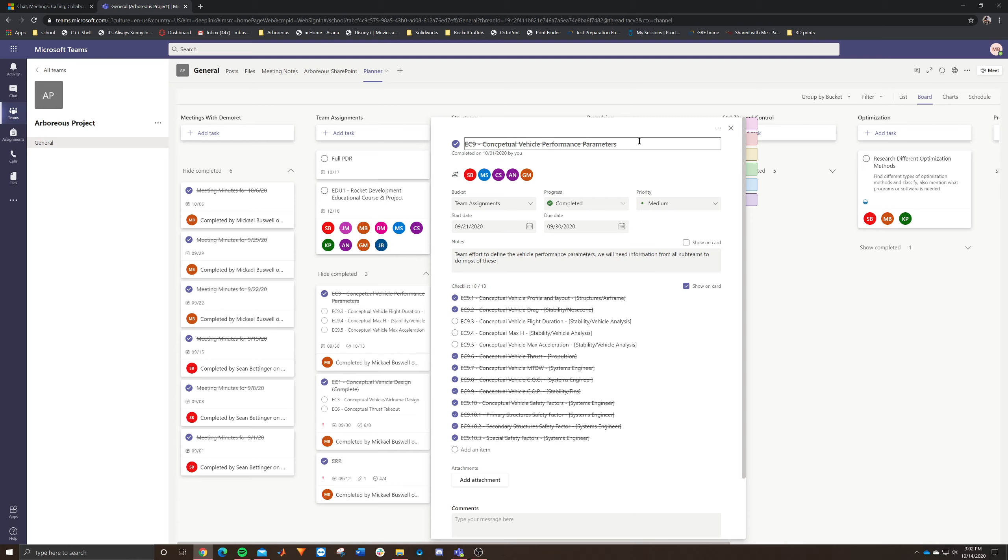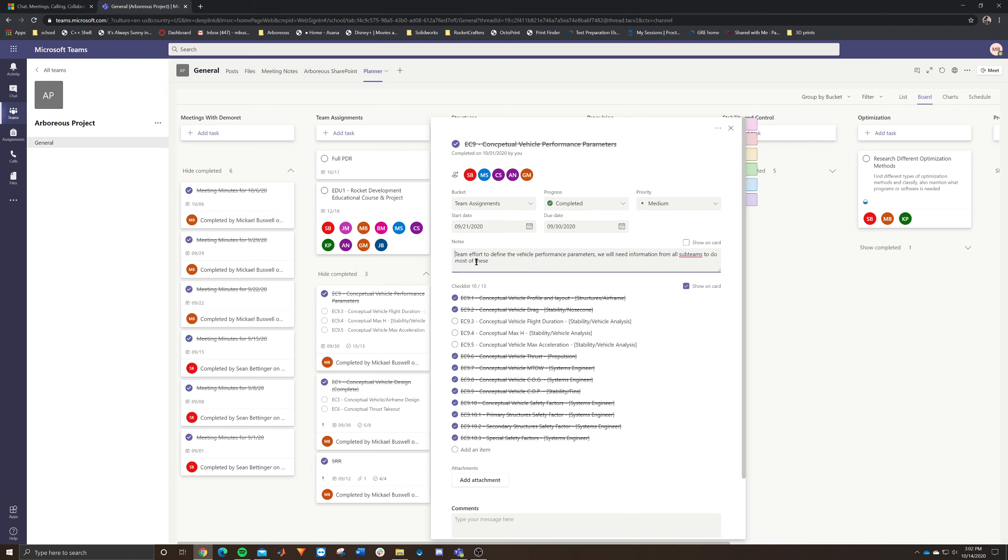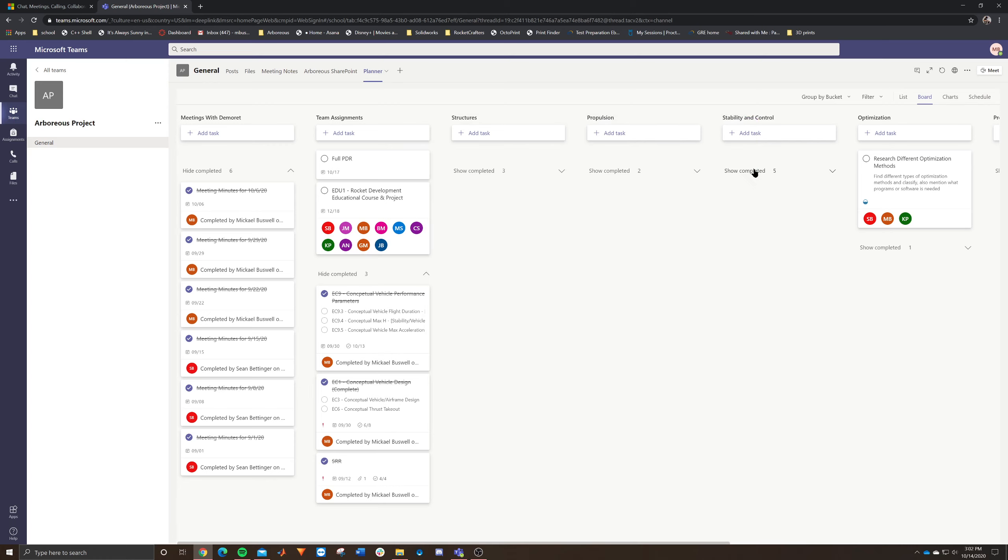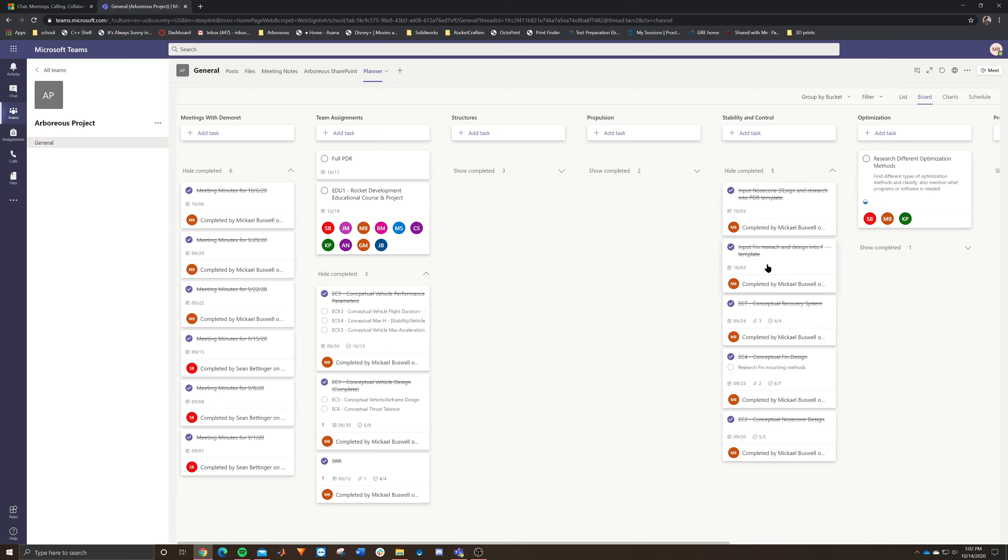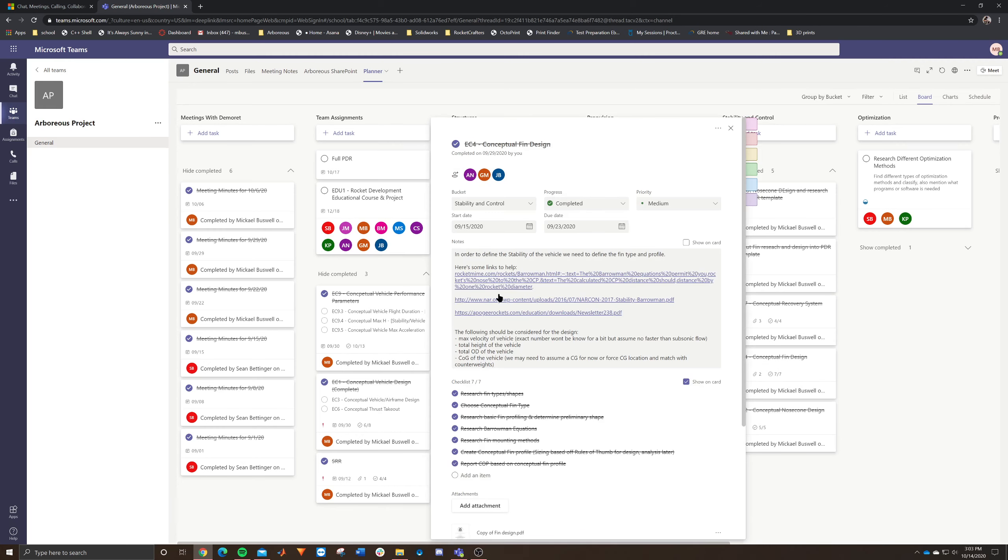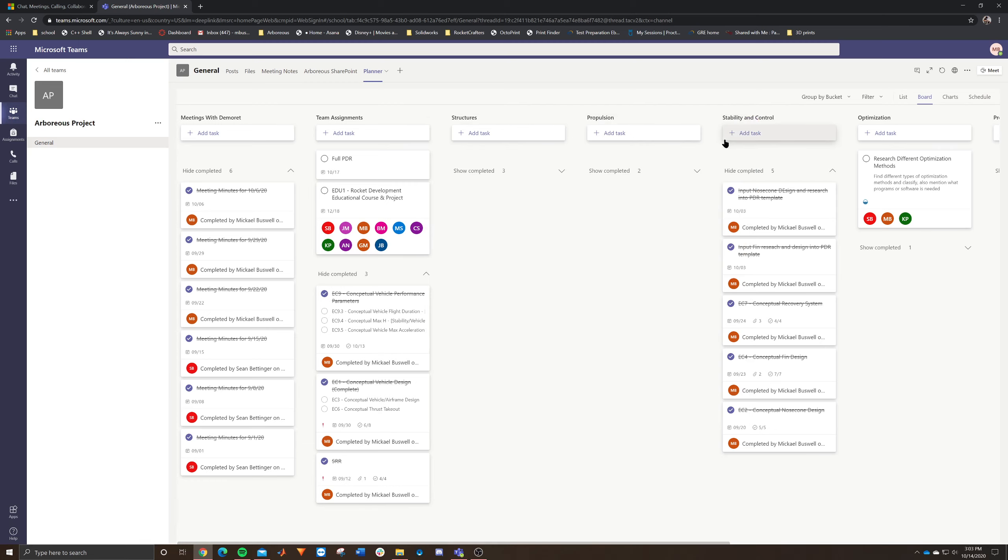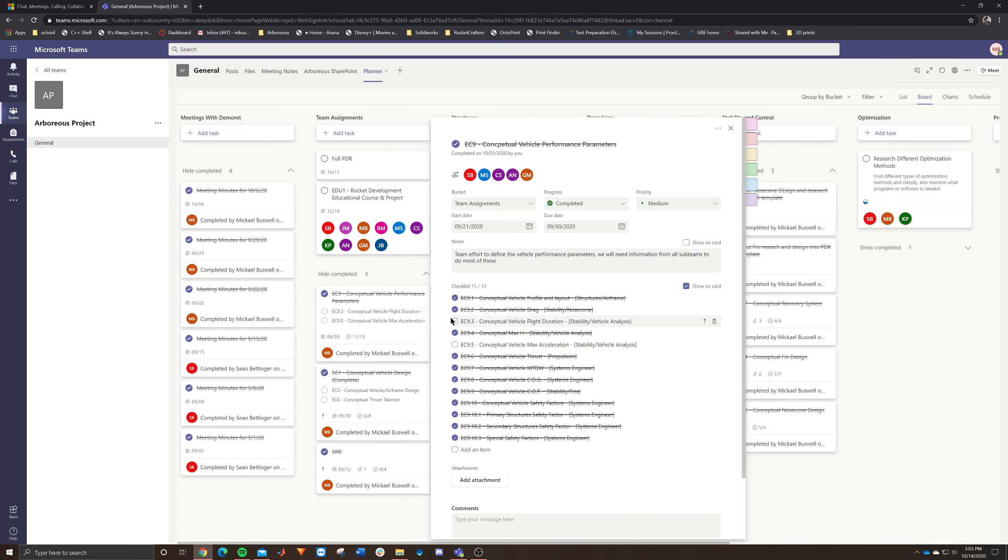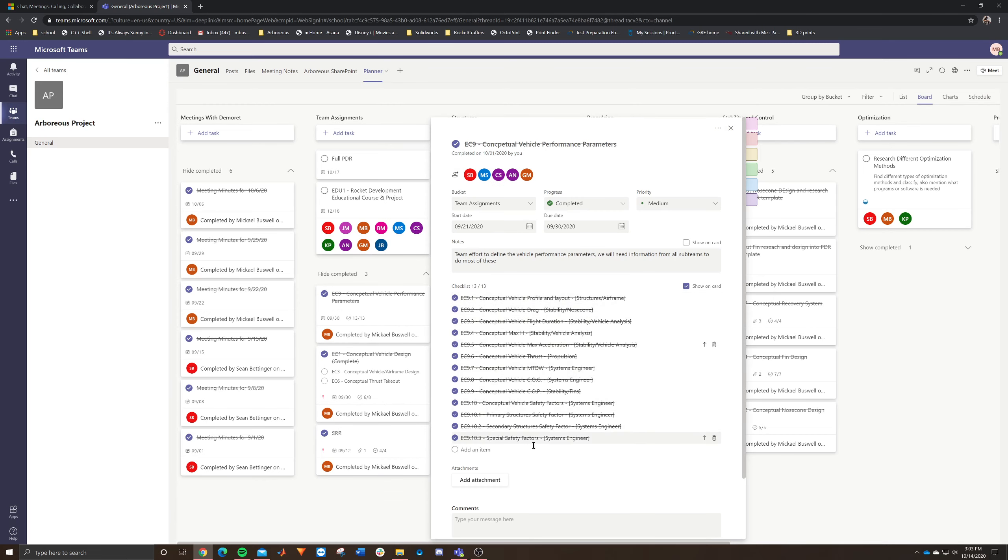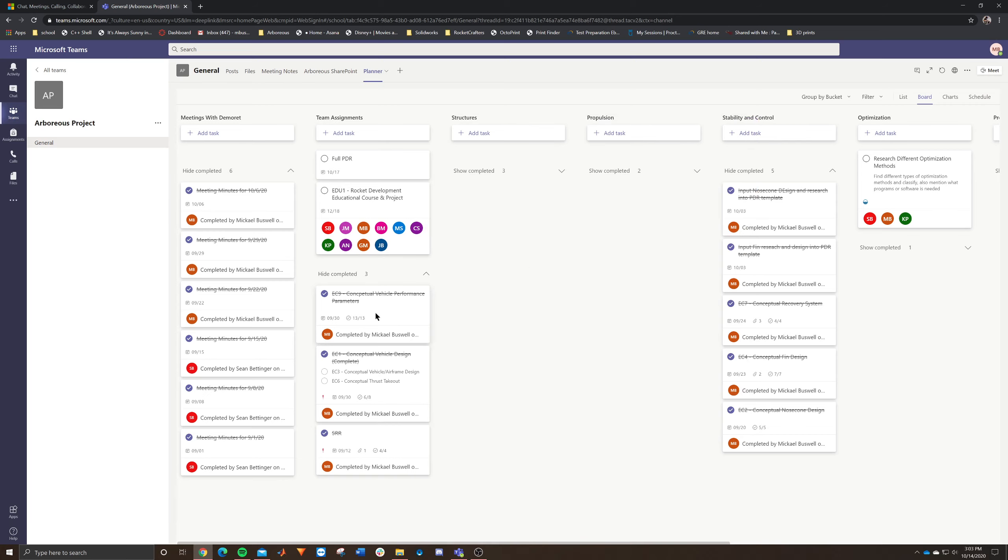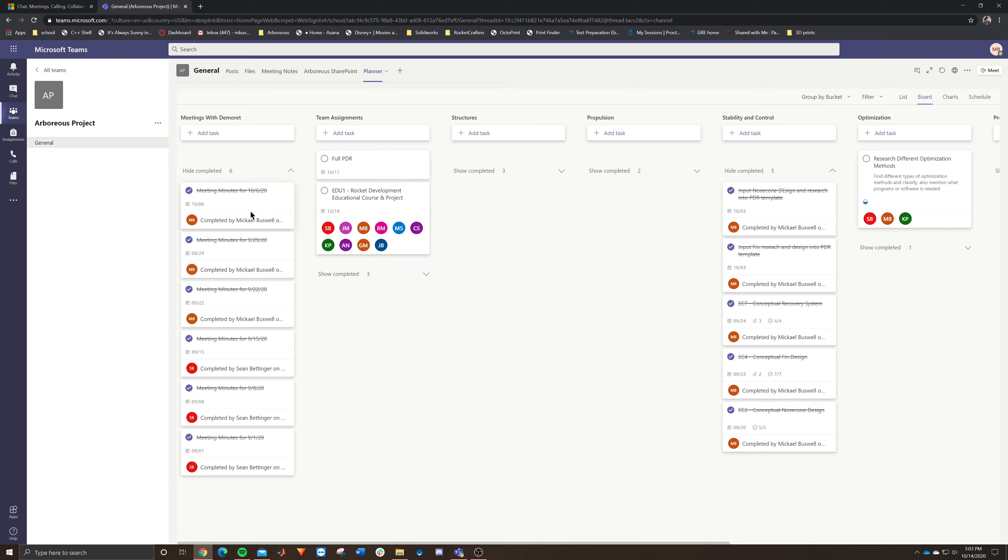And then from here, you can set your name, you set the due date, start date. You have your progress, your priority. You can put in notes. So I usually put in a little text, but also in some other places I might put in links to help. It's a cool way to add relevant information to this specific task. So then the people doing the task don't necessarily need to run around everywhere. And then it's cool because you can actually select off and you can actually make a checklist and break up the bigger task into multiple steps and then check them off as you go. And then pretty much whenever you're finished with it, you just click the overall task complete button and then it marks it off as completed.